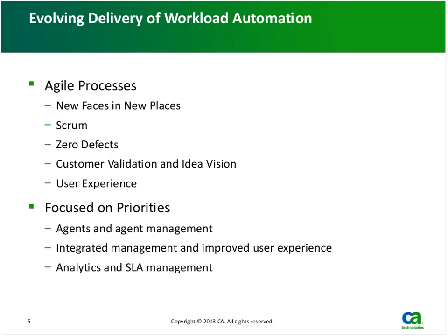Now, obviously, we have a backlog of issues that are still open from the older projects, and we have projects in place now to go back and fix all of those issues. Obviously, we can't do this within the 2 full-week time frame unless we have good automated test suites rather than manual test suites, and we're also doing a lot of implementation there on test automation. So there's going to be an initial lack of velocity as we're focusing on those things rather than focusing on delivering new innovation.